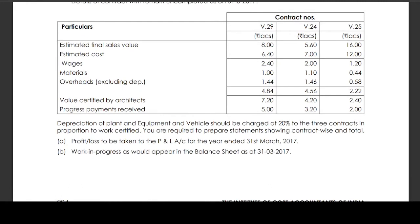Depreciation of plant and equipment and vehicles should be charged at 20% to the 3 contracts in proportion to work certified. We are required to prepare statements showing contract-wise and total profit and loss to be taken to the profit and loss account for the year ended 31st March 2017.